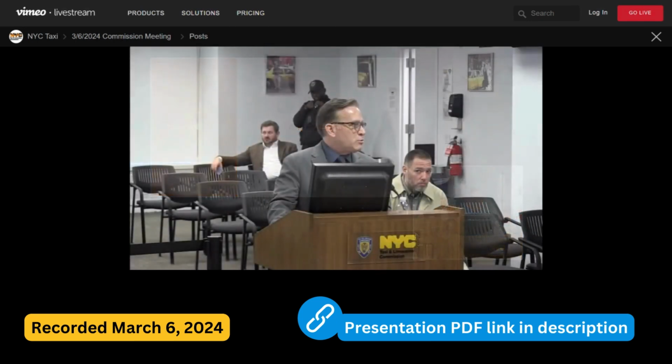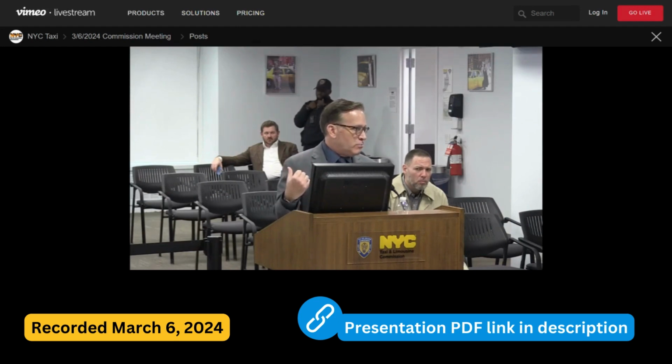So December 2028 is the current date. We know that's going to change slightly because of the added scope for the EV charging. DDC is doing the project management, and we're expecting later this month to have an updated plan. But we'll be trying to squeeze it to as close to that December date as we can.